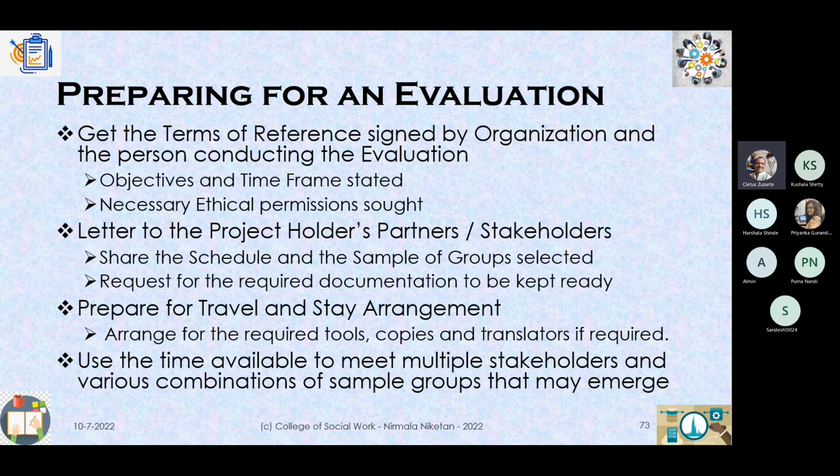Okay, and also share with them the process that you are engaging. Suppose you're going to use a tool, you may not share the tool, but you can tell them that you are going to use certain tools like a focus group discussion, or a particular survey which can sometimes be confidential. So you could use a survey tool, or an interview method, or something like a PRA. Sometimes a PRA is very helpful, especially if you're going down to the grassroots and working with an SSG, you do a PRA exercise with them. Actually do one of the PRAs so that it confirms the baseline or negates it.